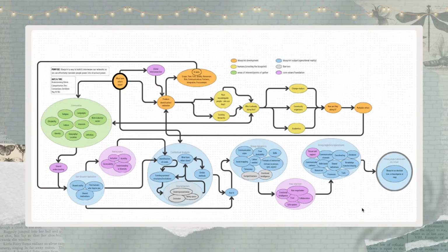So most likely when something doesn't have a connection in or out, and it's not the beginning or the end, there's a gap, and we have to find what is causing the gap. So that's one of the beauties of interconnected systems. You can realize what your gaps are, because the gaps are going to generate a risk somewhere.